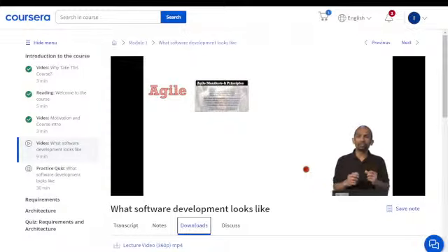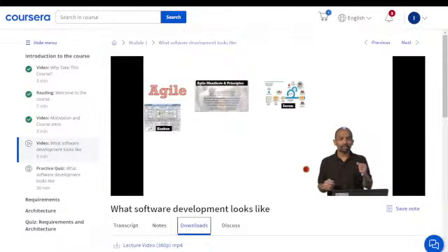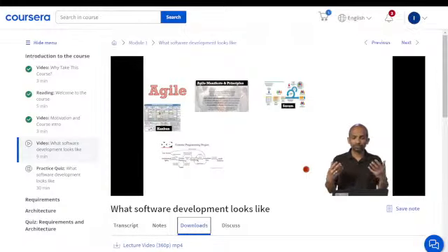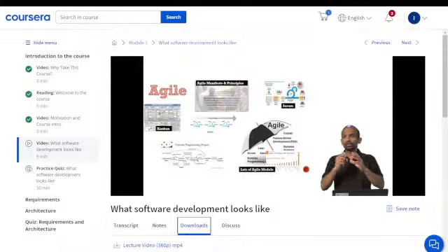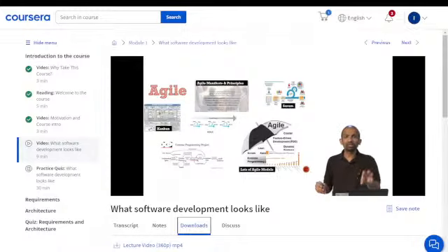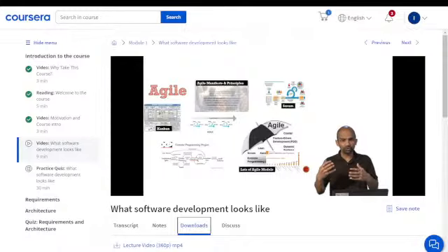And as this manifesto and principles were crafted, there were models like Scrum and Kanban and XP that helped implement and promote this mindset. And so you can see it's not just these three, but many other models came into being. The basic idea behind all of these models was that instead of building this whole one-year cycle, you build in short cycles. So you define a little, you build, you test, and you learn. And then again, you just keep doing this. That way you can adjust to the market quickly, and you are learning from your users quickly.